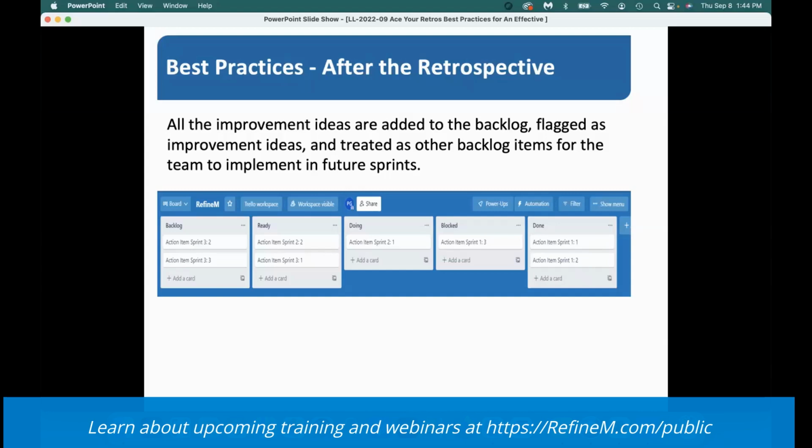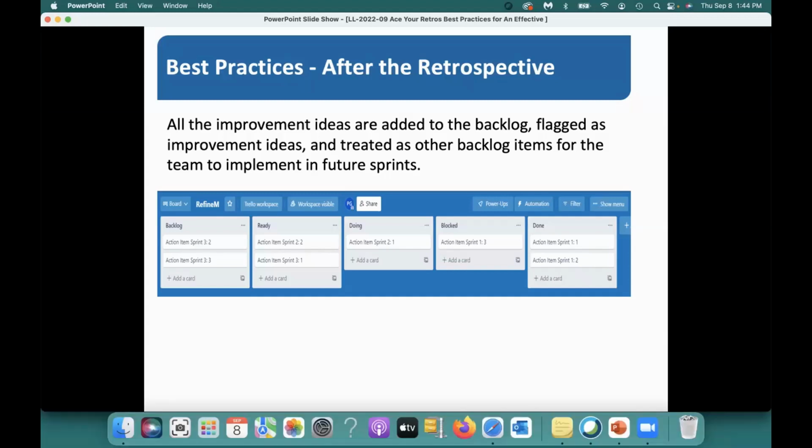You may color that ticket in a different way, but make sure that you have at least one action item that you are doing in every sprint or every retrospective window, whatever that is: 2 weeks, 3 weeks, 4 weeks, right? I heard somebody from Salesforce talking about a 3-week window, which is fine. So in that 3-week window, have at least one, which you can show.